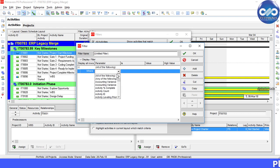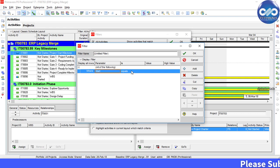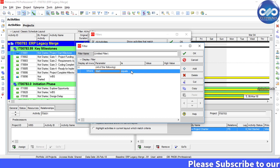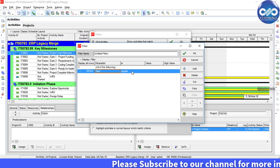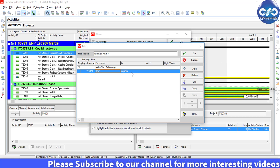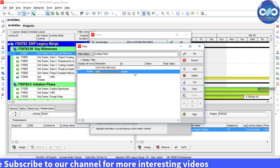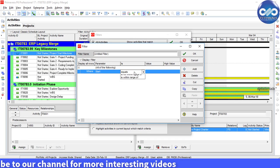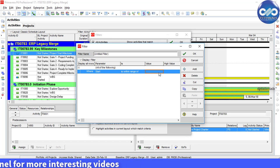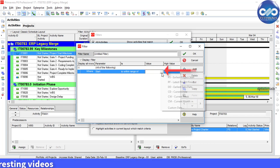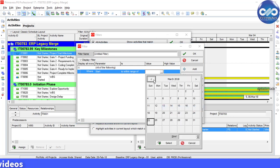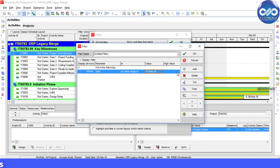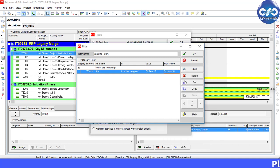Here, set the parameter to start. We are going to create a filter to highlight activities that are scheduled to start within a range of dates. Set the variable to is within the range of and set the value to a custom date say 1st February and the high value to a custom date say 31st March.